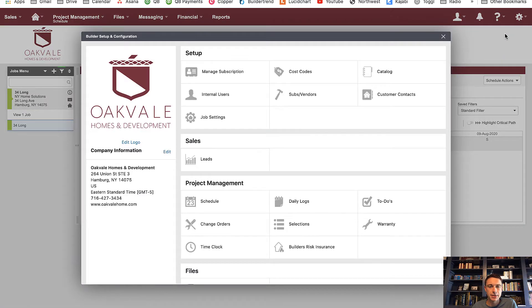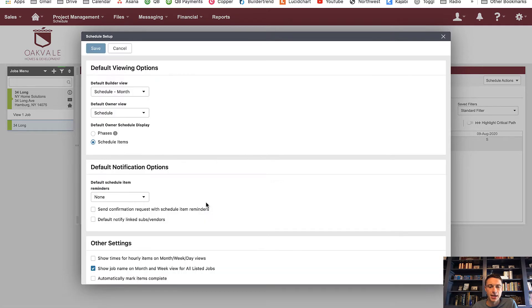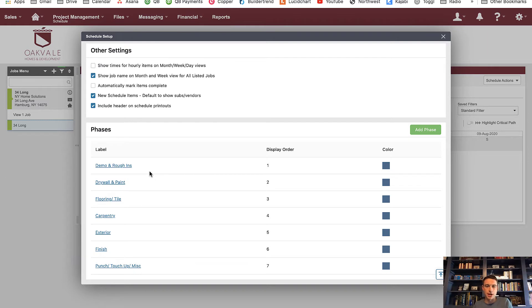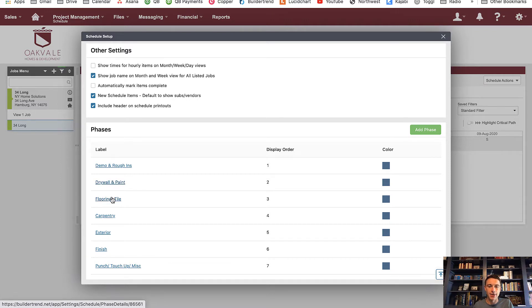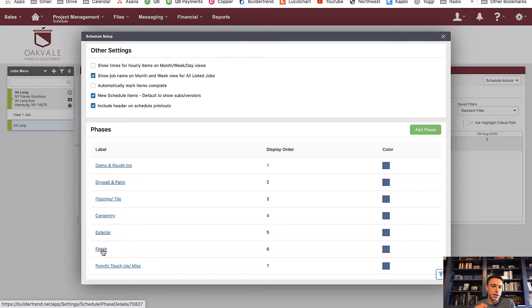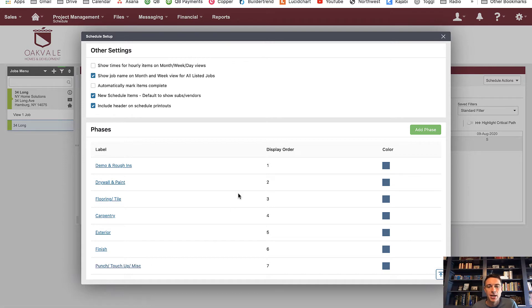Let me talk about phases. You'll need to set up your own, but you can certainly use mine. In my settings under schedule settings, you can see my phases. I organize projects with demo and rough ends — that's demo, framing, rough plumbing, rough electrical — moving into drywall prep and drywall itself, insulation, and paint. I have phases for flooring and tile, carpentry (vanities, interior doors, casing, trim), exterior (windows, exterior doors, roof, gutters, soffits), finish (finish electric, finish plumbing, hardware, shower doors), and finally punch, touch up, and miscellaneous for the end of a project.